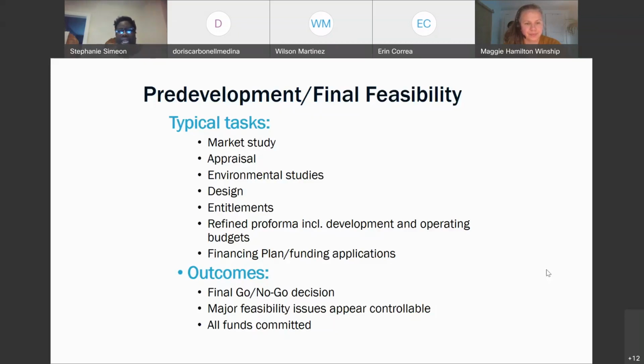So the phase 1 is saying what's there. They dig in the soil, they test the soil. If it's an existing structure, they look in the history of the structure. They want to know what was going on, what has been there in the past. So they check it and they test everything. If it's an existing structure, you want to test radon, asbestos, and lead. Those are the top things you definitely want to test.